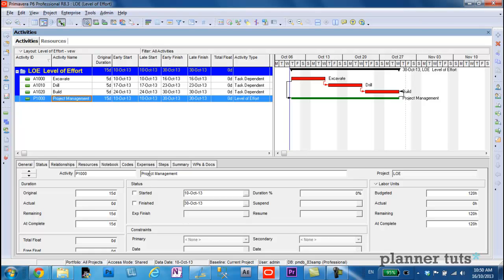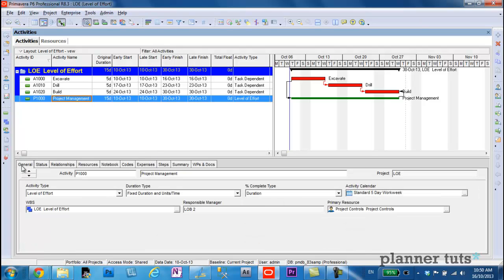how does a level of effort get its actuals? In this video, I'm using duration percent complete type for my level of effort. So it's a straightforward duration percent complete.